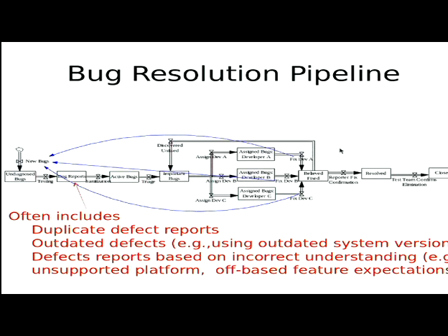So you may kick a lot of these back to this stage, but if the reporter of it, and often this is someone in the test team or an end user, confirms that it's resolved, it'll be going to this resolved category. And sometimes there's a further process by which it's viewed as closed. Case closed, it's done, it's in the past. Now, is that the end game for the bug? Is that the end game for that defect? Not necessarily. It may come up again.